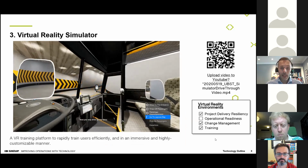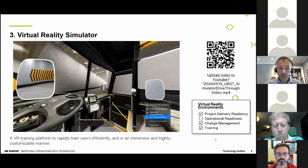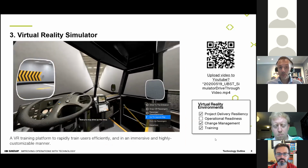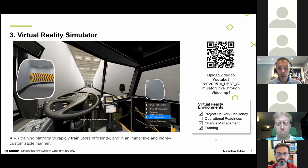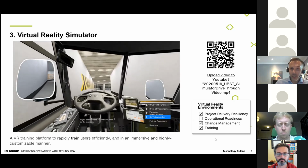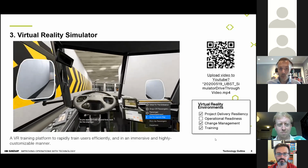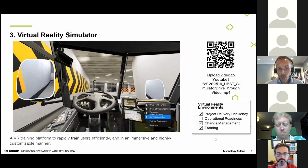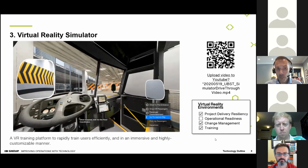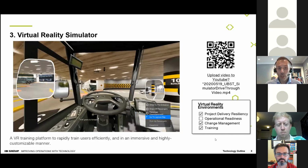construction. Again, I can't stress enough, there were competing interests in terms of timelines and delivering the facility. It was identified early on that bringing all 800 drivers into the space for a formal orientation was not going to be feasible without significantly impacting the ability for construction to complete.